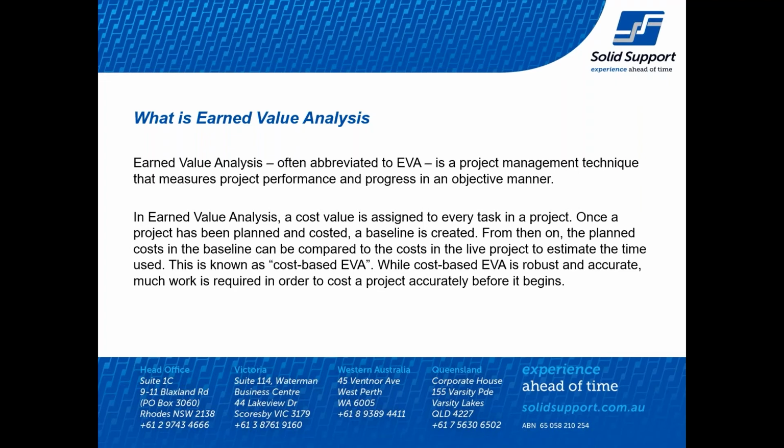Powerproject supports earned value tokens, and one of the things we'll come to is that to get full earned value analysis information inside Powerproject, or in a planning or scheduling tool, you would have to cost load your project. What we're also going to show you is the EVA reporter, the earned value reporter, which allows you to not have to cost load your project, but still get an EVA graph of how you're performing.